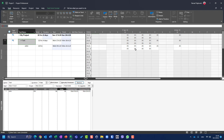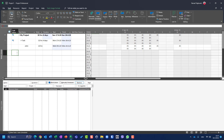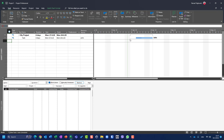You will see that in this particular case, you will not get what is expected — that the delay will be applied only to the remaining work. No. The delay will be applied to the remaining work AND to the work which was actually done previously. So once again: undo, mark that John finished 50% at Monday and Tuesday, then put a delay of two days and click OK. Microsoft Project says the task was delayed, so not only remaining work was delayed but actual work was delayed too. I will get the same result as before. Going to the Gantt chart, you can see the delay is applied.